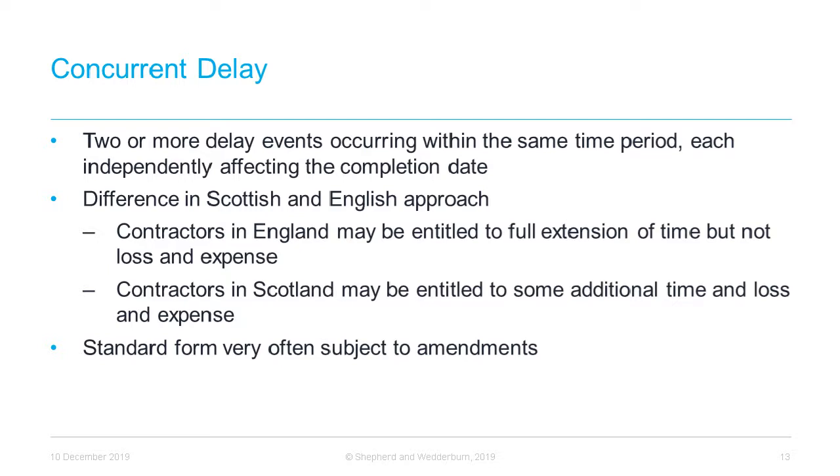However, the leading Scottish decision states that it may be more appropriate to apportion the delays between the parties. The practical effect of these differences is that in England, contractors may be entitled to a full extension of time but not loss and expense, whereas in Scotland, in the same factual circumstances, they may get additional time as well as some of their loss and expense.